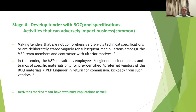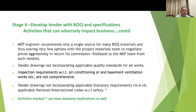Stage 4 is developing the tender — this is common for both air conditioning and basement ventilation. Risks here include making tenders that are not comprehensive, technically vague, or deliberately ambiguous to allow subsequent manipulation by contractors in collusion with MEP team members. MEP consultants including names of specific pre-identified brands linked to preferred vendors with consequent kickbacks is an unethical practice. Tendered drawings must incorporate applicable quality standards, statutory requirements, and clearly define inspection requirements for BOQ items, work in process, and the final completed system.